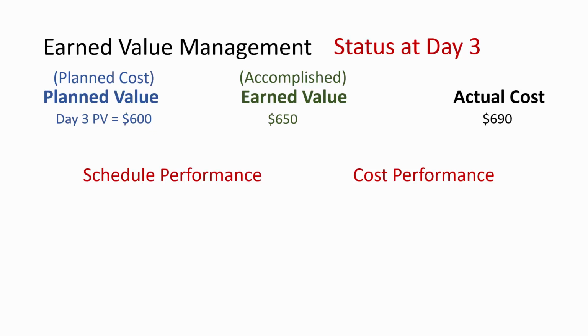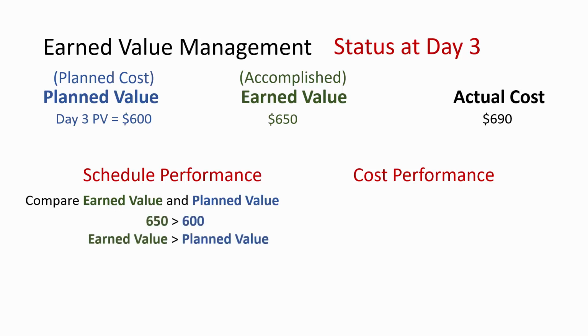For schedule performance, compare the earned value and planned value. In this case, the earned value is more than the planned value. In other words, the students accomplished more than expected in the first 3 days. They are ahead of schedule.